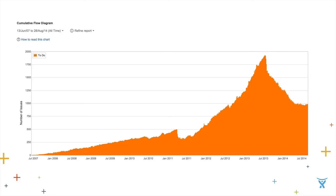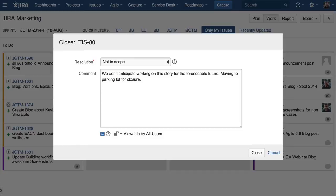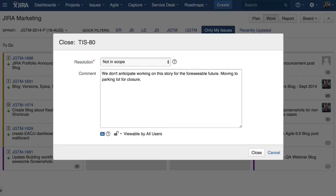The challenge then comes: I get a number of questions from product owners of how do I manage my backlog? How do I triage issues more effectively? How do I keep pace? The answer is, you close issues. You align your backlog with your roadmap. Closing issues doesn't necessarily mean that they're gone, that they're deleted, or that you can't come back to them. It's just bringing your reality of where your roadmap is in line with your backlog. As you move these issues from an open state to a resolved state, it communicates to the business what the priorities are, it helps a product owner more efficiently triage through their backlog, and it keeps the stakeholders aware of where the product is going.